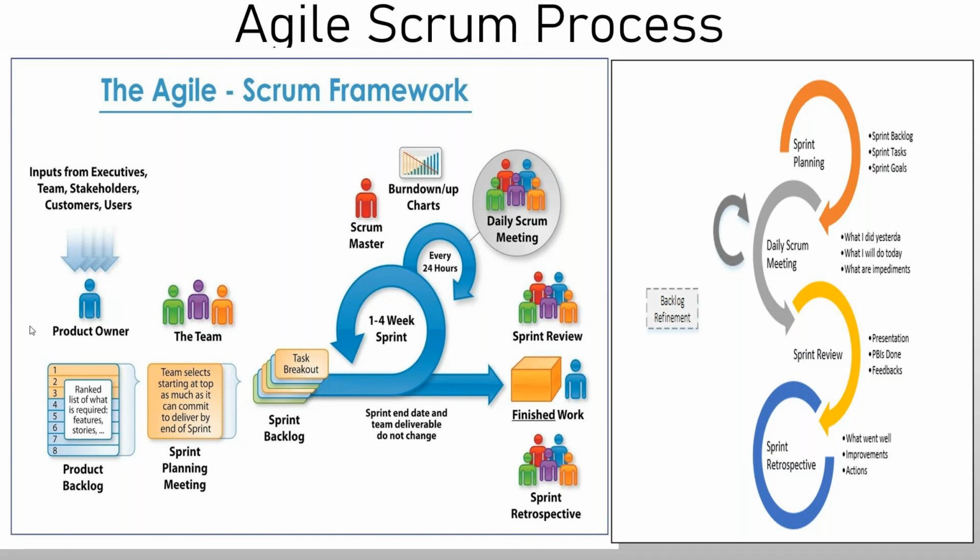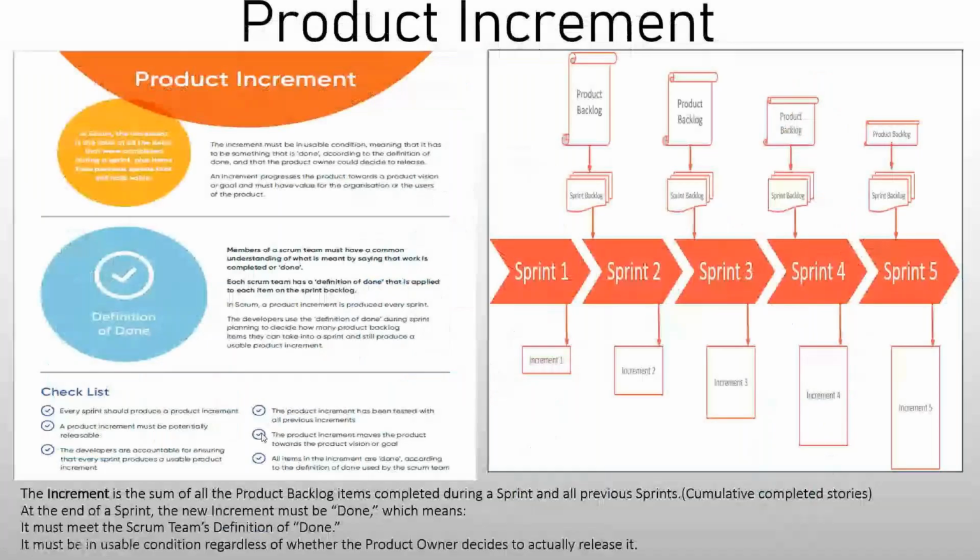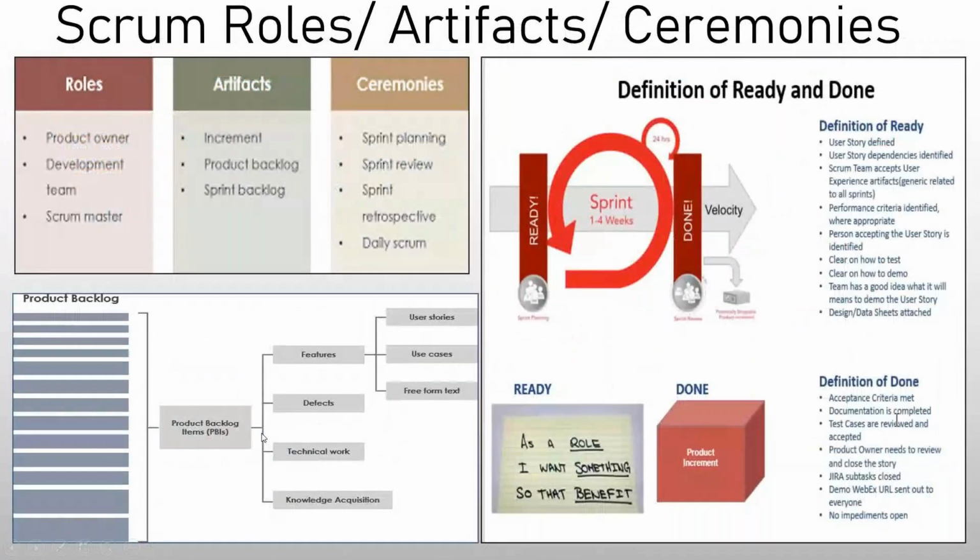Having said that, the product backlog includes a few other things also. It doesn't mean that it will have only requirements as a list of things to deliver. A product backlog contains PBIs, product backlog items. It does have the features. We discussed the features. The product backlog may have defects. The product backlog may have some technical outstanding things which you have to pick up.